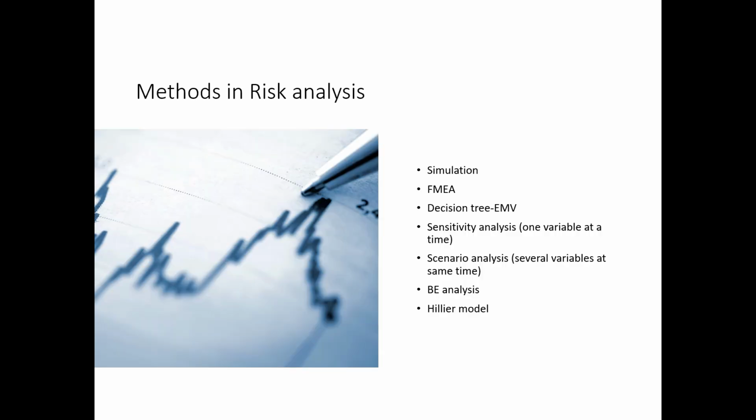The methods for risk analysis include simulation, FMEA, decision tree EMV, sensitivity analysis, one variable at a time. We check how the other parameters vary by varying one parameter or a variable. That is called a sensitivity analysis. Then we have scenario analysis, BE analysis, break-even analysis, Hiller model.